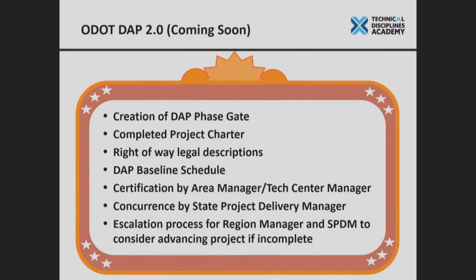We still sign off with the area manager and the tech center manager. We have concurrence by the state project delivery manager, which is David Kim. And we do have an escalation or exception process if for some reason we want to keep moving and there's some little low-risk item that has us hung up.